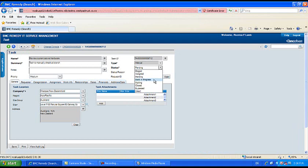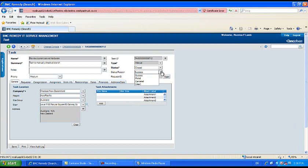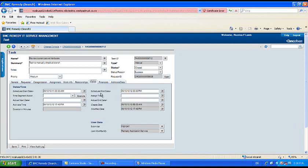Once the task is completed, set the status reason to close and select the status reason. The final step in closing a task is to click on the dates tab and add the actual start and end date that you implemented the task. Then click save.